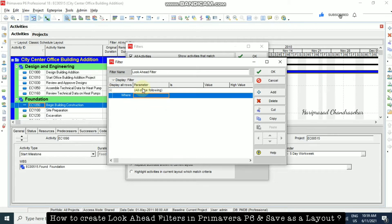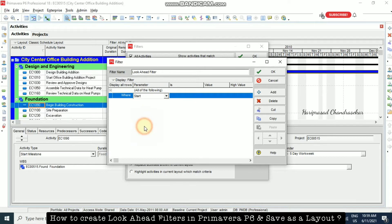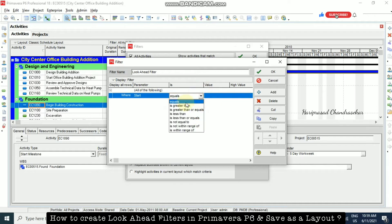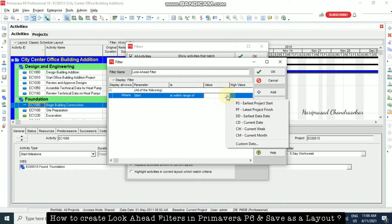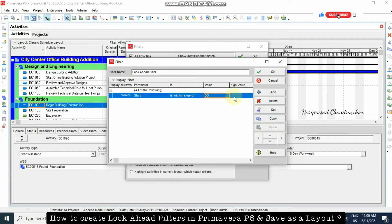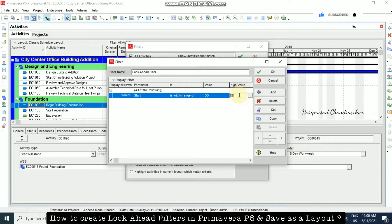Now I am going to select the parameter for where. I'm selecting Start, and then 'is within the range of'. For the low value I am selecting DD — that is the data date. For the high value I am also selecting DD, and then plus — if you want a two-week look-ahead filter, you need to put 2w.